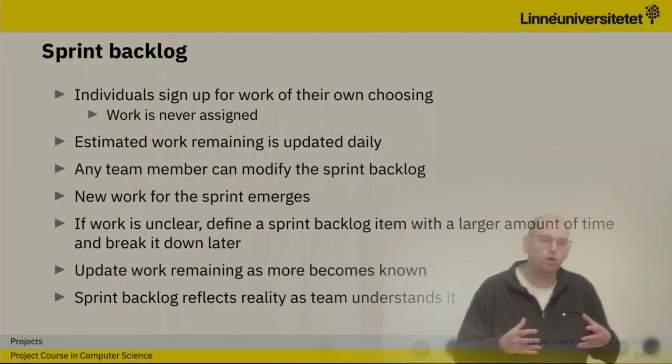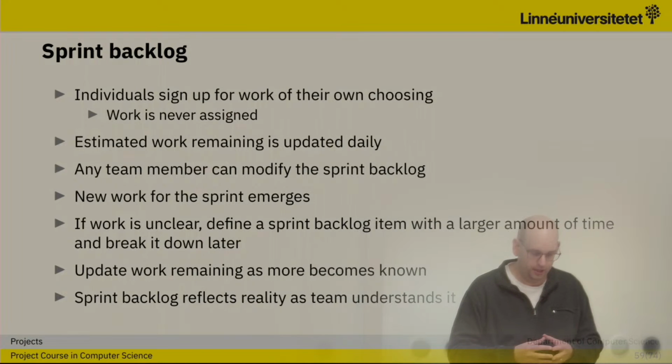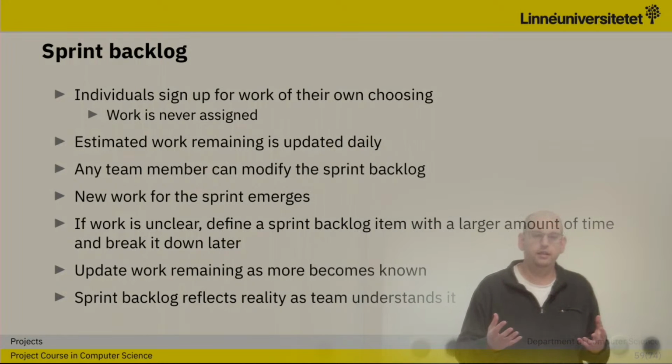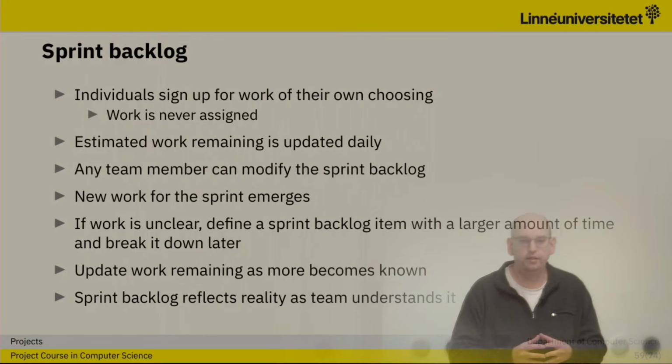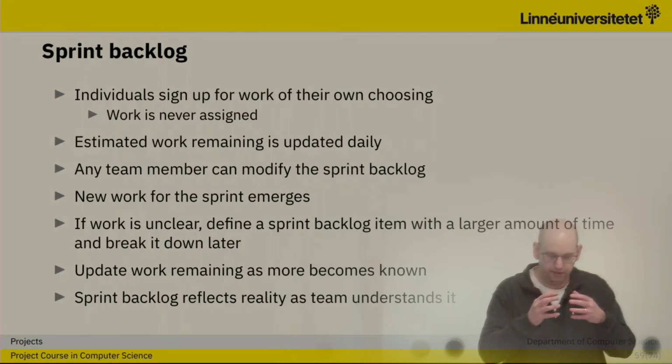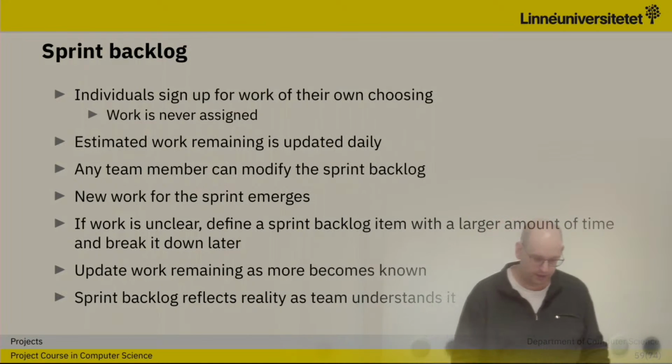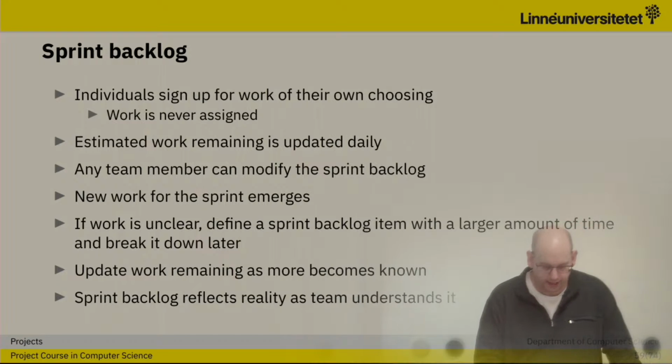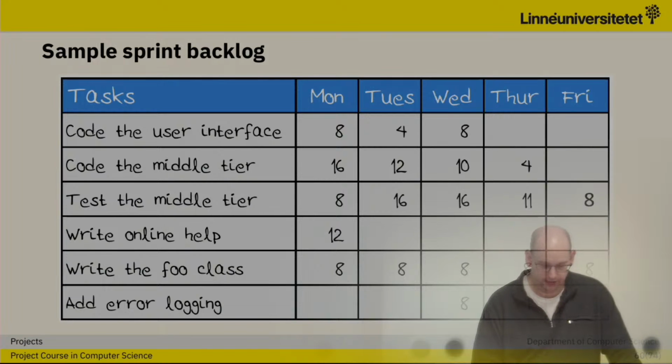We cannot put in more work, but we might need to divide a user story, or we need to define it, and we need to put in some more work because this meant more than we thought, and so on. And if there are parts that we cannot do, define a sprint backlog and break it down even further and put it back in later on. Yeah, and it could look like something like this.